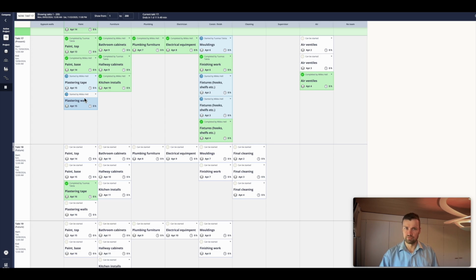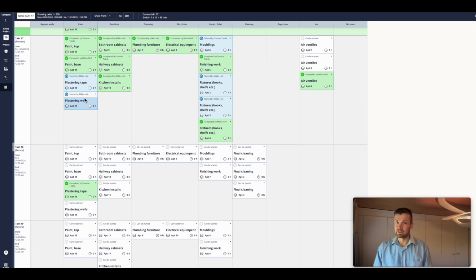That's fine. But if there are some problems, then in the morning huddle view, and the morning huddle is the place where you can raise your voice and tell all the concerns you have regarding your work, or maybe even other work groups' work. And I want to stress this, that the morning huddle is really crucial, really crucial. If those are not done on the site, then the success of the takt goes dramatically down.